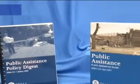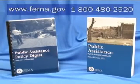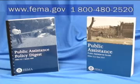An environmental review is required before the project is started. TDM and FEMA must approve the improved project before construction begins. It's important to consult the PA Guide and PA Digest as well as TDM for information and guidance regarding alternate and improved projects. Certain deadlines, limitations, and requirements apply.